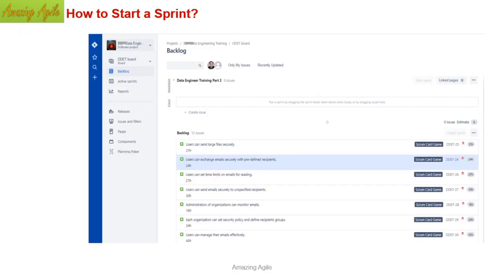Now let me say how to start a sprint. That is another good concept, and it has to be done mainly by the product owner or scrum master. When and how? During the sprint planning meeting. Suppose in the sprint planning meeting, you identify that these 7 stories are supposed to go. You already discussed it in your sprint planning meeting, your sprint planning board is updated, if you are doing it in a room or wherever. Then assuming that these 7 stories, whatever I am showing here, are the most prioritized, and they are going for this sprint.